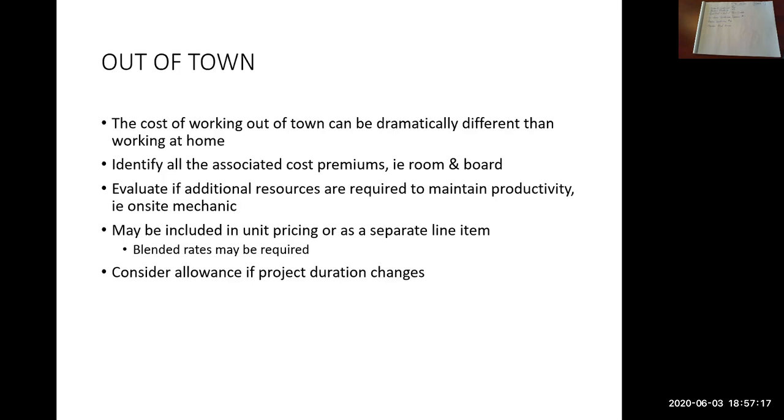But a 1 week or a 2 week or a 3 week overrun on an out-of-town estimate can really add a lot of cost to the project. Now, if that schedule overrun is not your fault, so not the contractor's fault, you should be able to be compensated by the owner. Again, that's contract law that we're not going to get into.